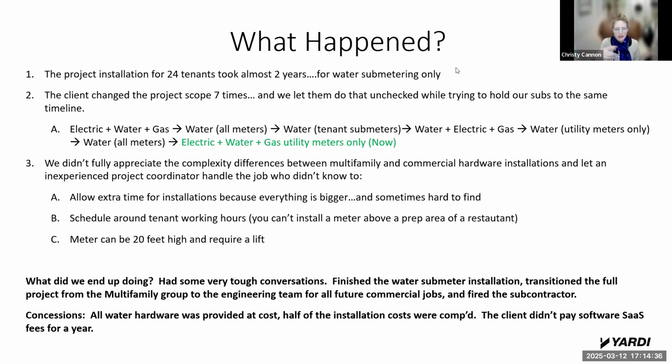But the other thing is, and this is regardless of the type of job, one of the other issues, and I think it's in here somewhere, is that we require someone from the property. So a client representative has to be with us at all times. And we do it for liability reasons, but we also do it because what if a piece of equipment ends up, someone later notices it's damaged or something was stolen or it's missing? We need to make sure that Yardi doesn't get sued, doesn't get blamed for something like that. So we have to have staff with us, and it has to be part of what is arranged. And that was a big issue too.